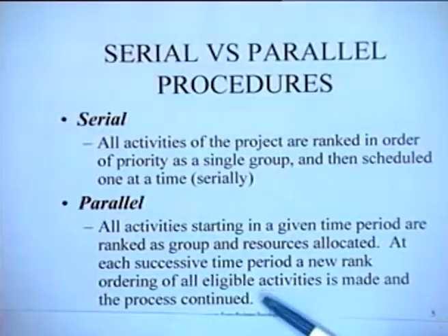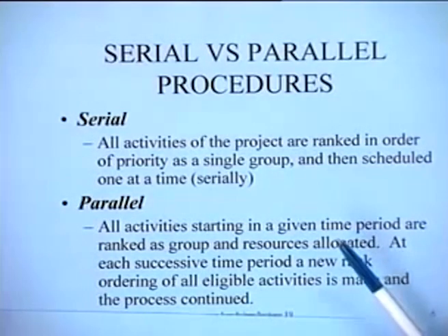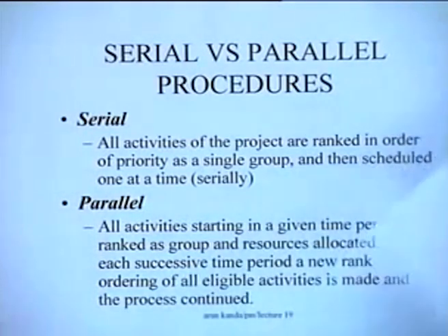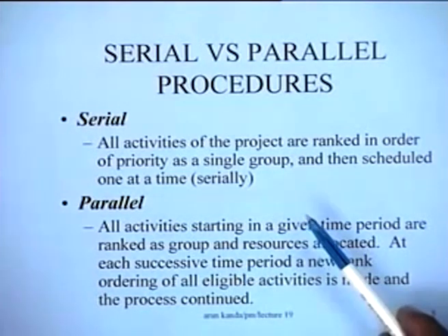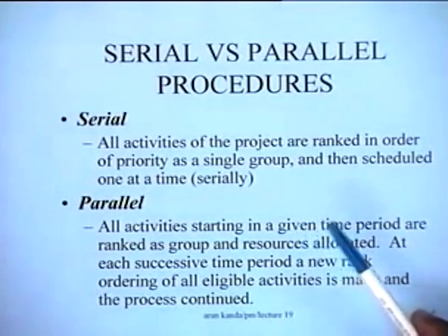So the activity can in fact improve its ranking or maybe worsen its ranking depending upon the situation. Now, out of these two kinds of procedures, parallel procedures have proved to be generally more efficient than serial procedures, and we will take a look at one such parallel procedure during the course of this lecture.